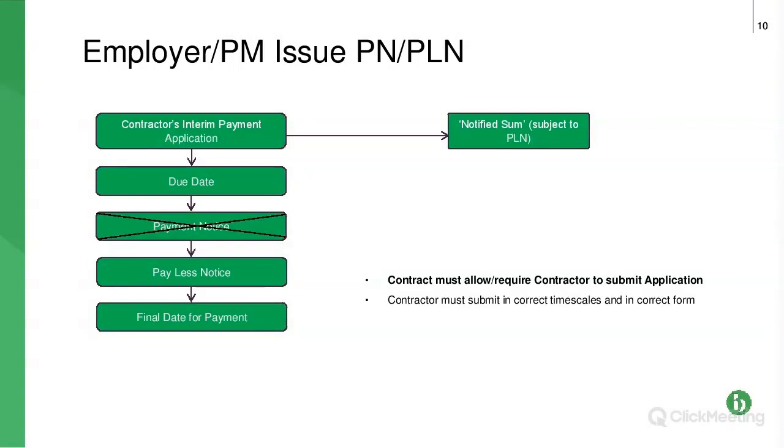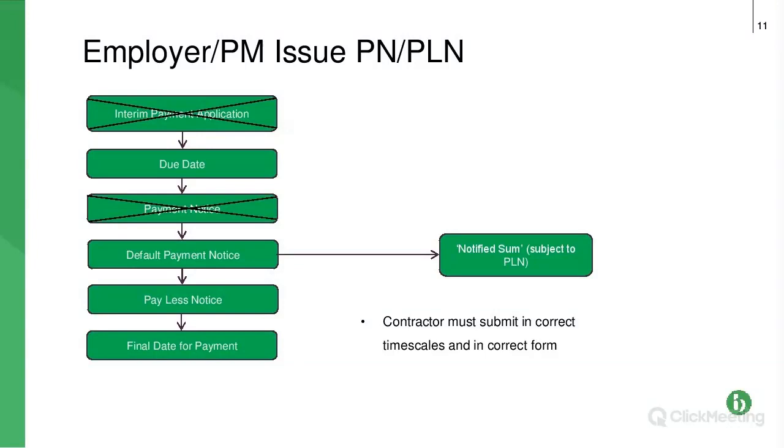So correct timescale, the correct form, so that's stating the basis of calculation and the sum due, and also, of course, serving the notice in accordance with the contract rules, what the contract says. So that's where you get the smash and grab scenario. Potentially, you can also have it in this situation.